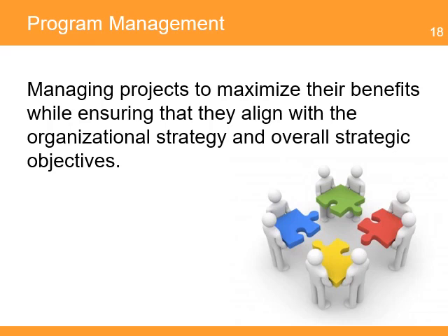In general, a program is a plan for effectively delivering development results through a set of projects. The projects are normally developed after the approval of the program, but program management doesn't simply mean managing interrelated projects. It's about managing projects to maximize the benefits while ensuring they align with the organizational strategy and overall strategic objectives. An important factor to remember is that every large project with subprojects does not automatically become a program. It becomes a program only when there is a conscious effort to coordinate the management and delivery of benefits.